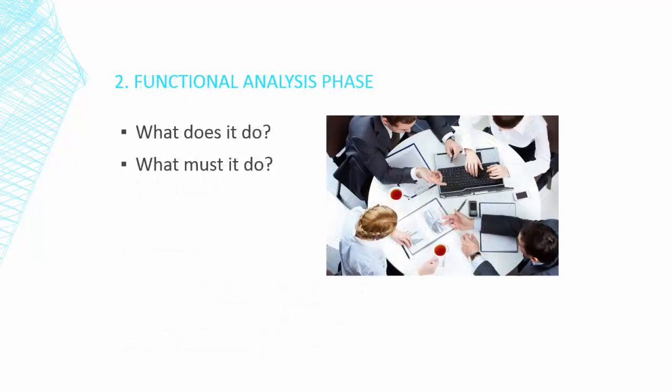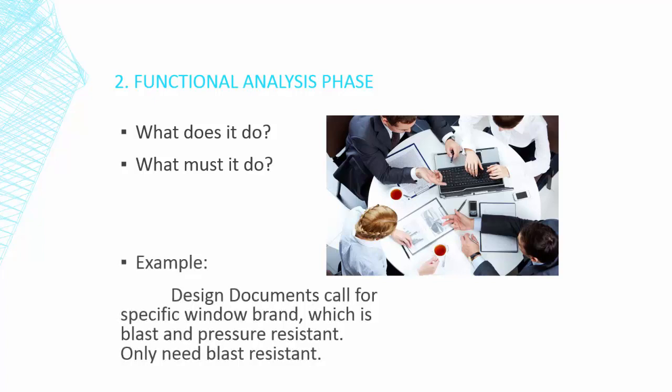Now we have this information at hand, we'll move on to the next phase, the functional analysis phase. Here the team looks at each potential system in question and asks two important questions: What does the system do and what must the system do? It's here we'll start to see the potential for savings. For our previous example of the blast-resistant windows, the design documents call for a specific window brand. This particular window brand happens to be not only blast-resistant but pressure-resistant as well. The owner's objective is to only have blast-resistant windows. So already here in step two, we can see that we have some potential for savings on this project.